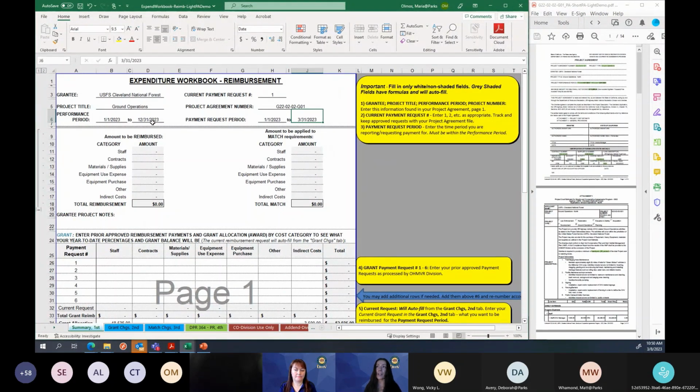If it shows up, say, for instance, January 2024, and then you weren't able to pay it until February 2024, that's okay. It's still within the 120 days that you have to submit your closeout. Do include it in your closeout and just make sure that the activity service period is highlighted on that invoice. That is what we are looking for.